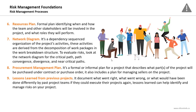Lessons learned from previous projects will be helpful as well — a document of what went right, what went wrong, or what would have been done differently by past project teams. Lessons learned can help identify and manage risks on your project. You need to use lessons learned from previous projects within your organization, and at the end of your project you also need to improve the existing lessons learned with the experience of your project.